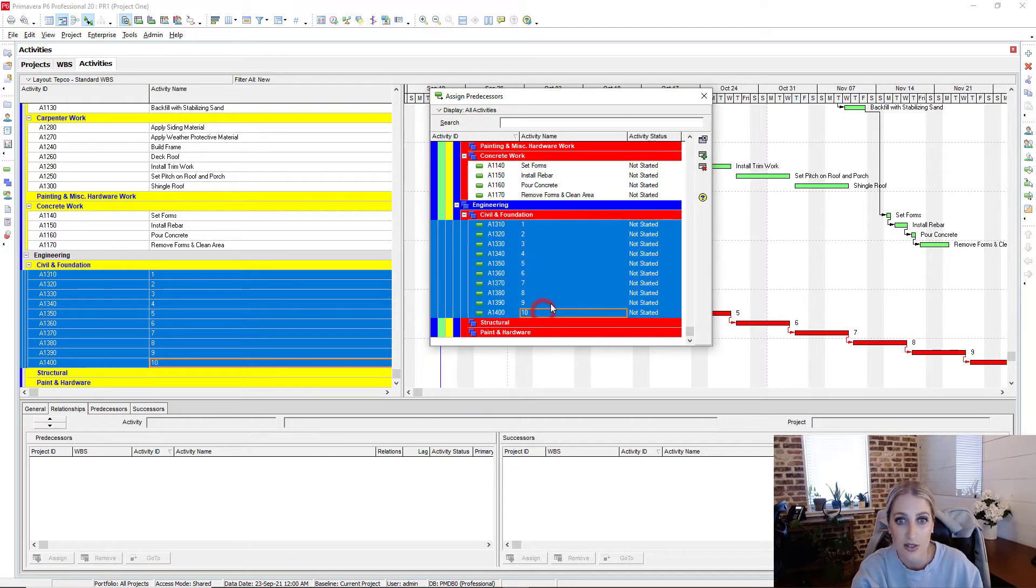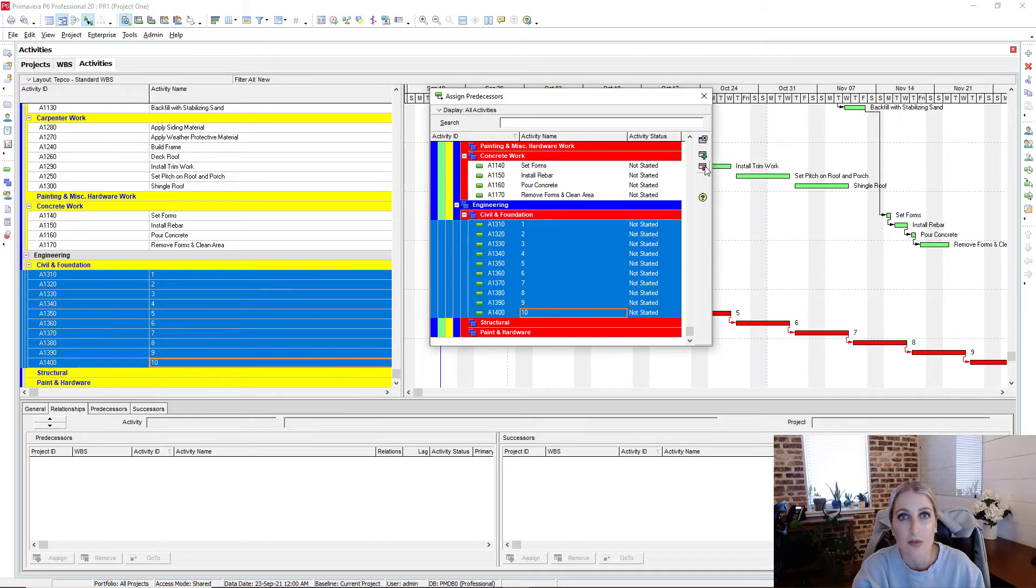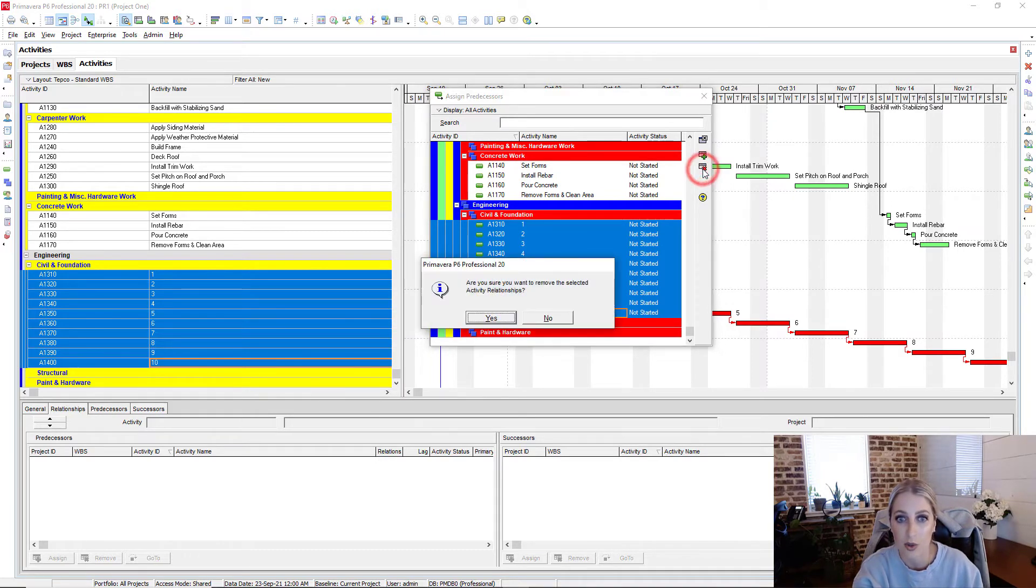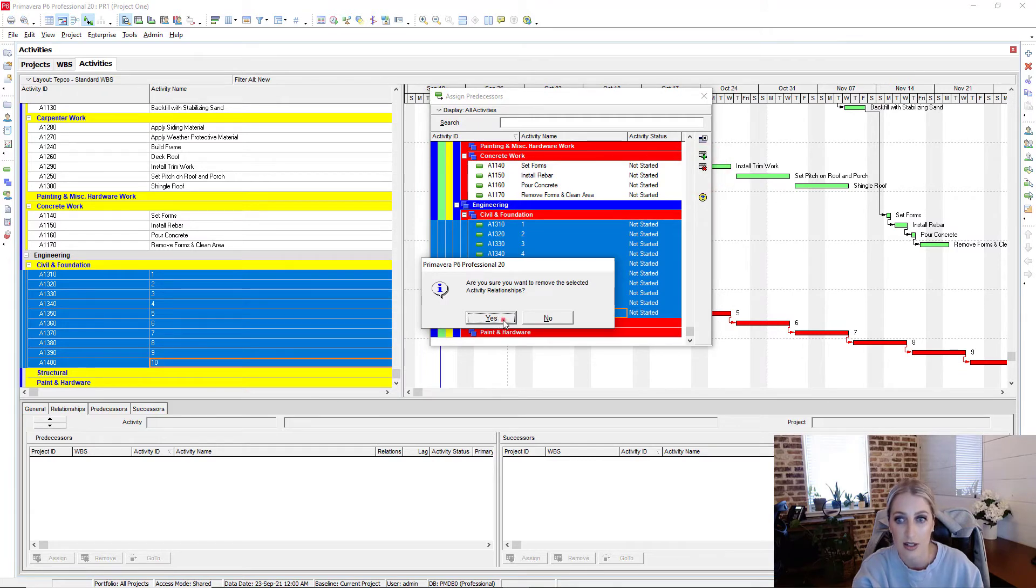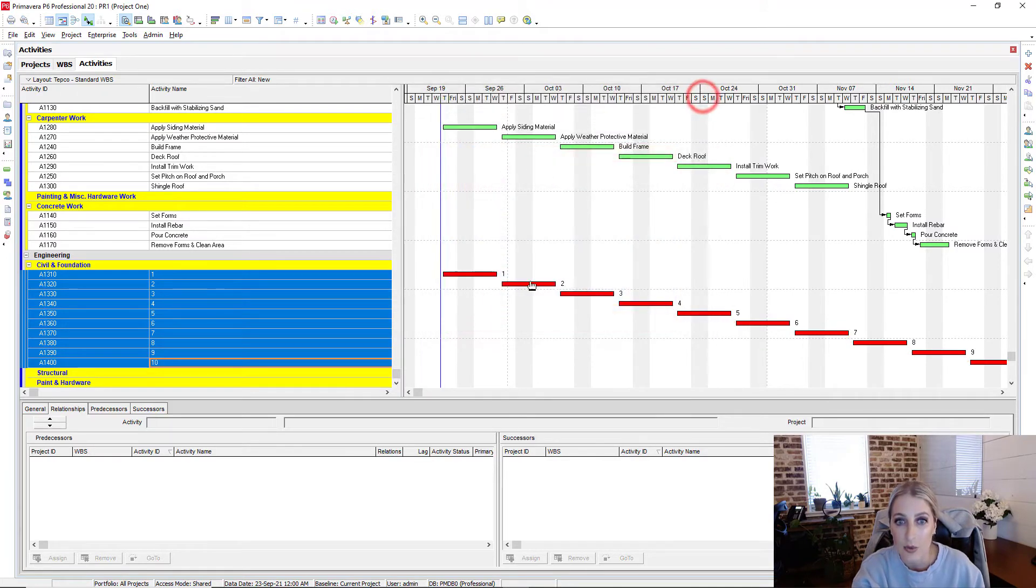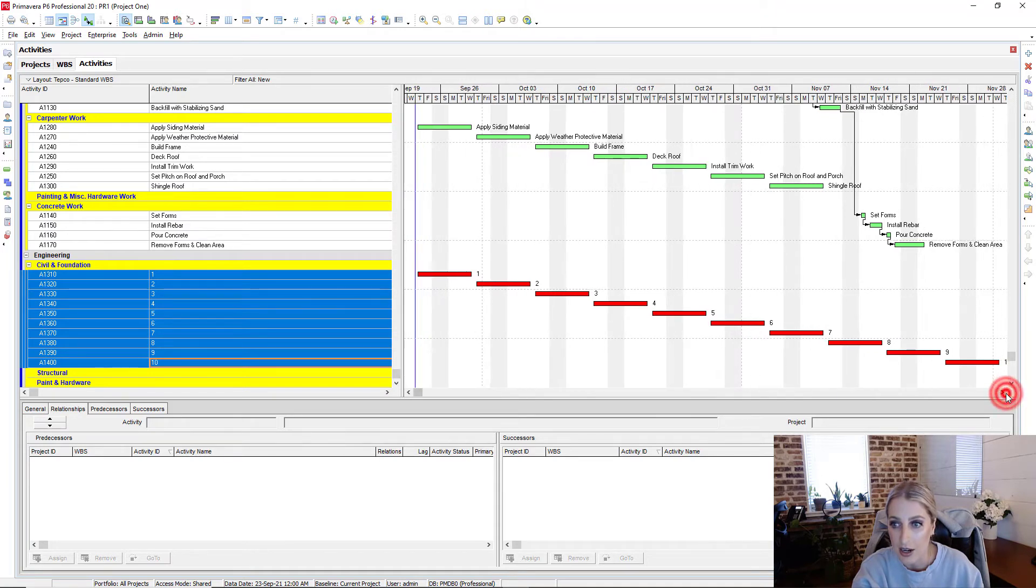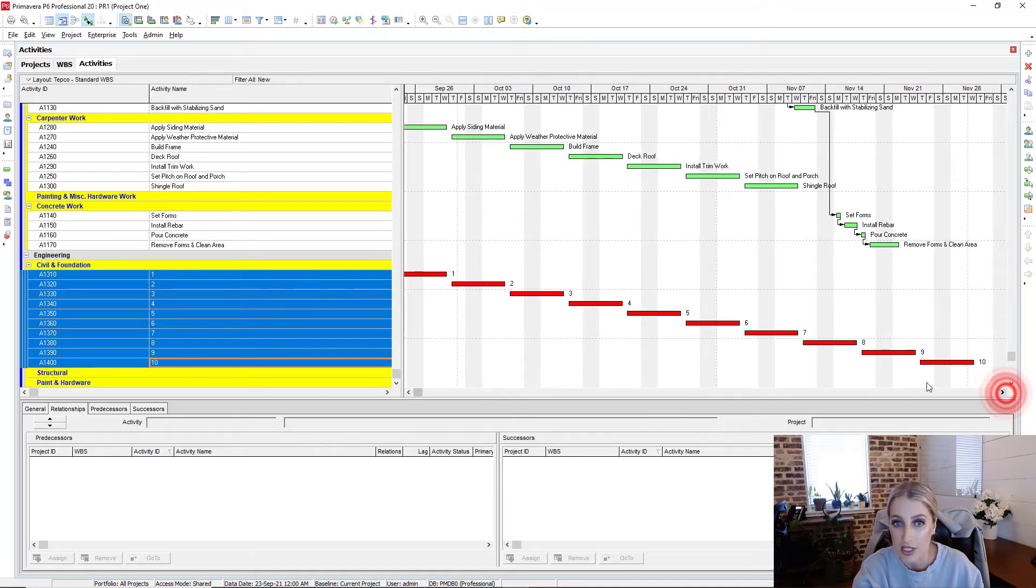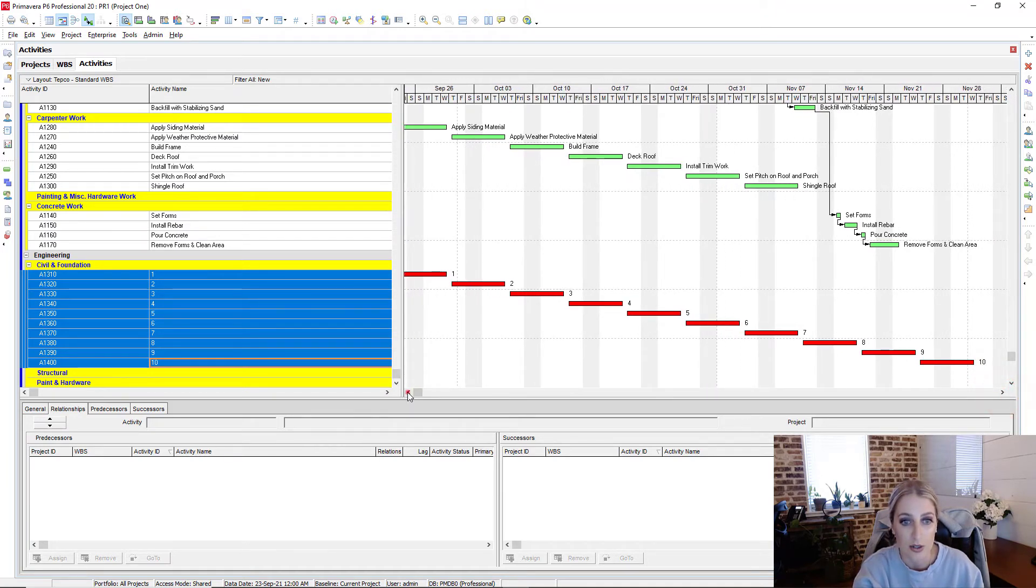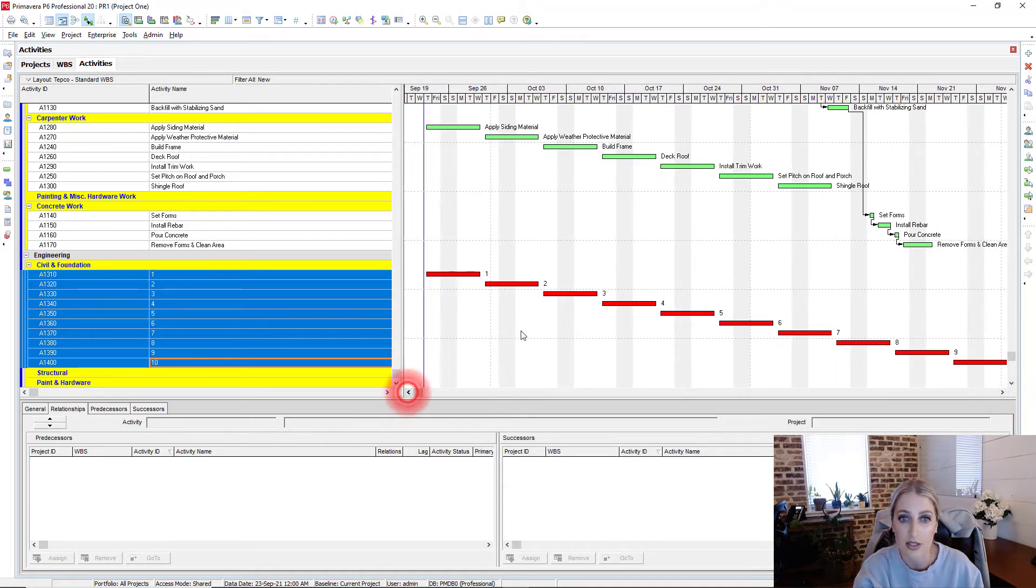Press shift, and then we see that that red X pops up. So we can click on that red X to remove the relationships. Select yes. And so we see in our Gantt chart that we no longer have the logic tied between those relationships.